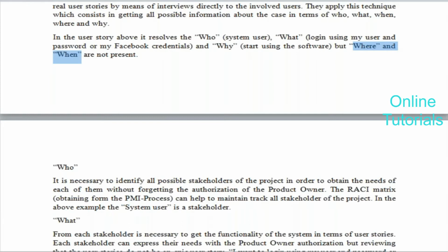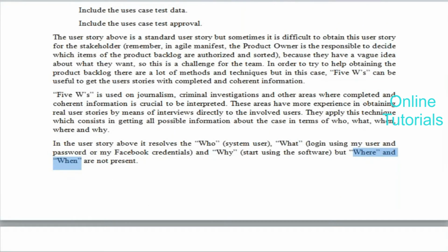Once you have written the user story followed by acceptance criteria, it will be forwarded to the agile team, so that based on this, where and when will be decided and completed by the agile team. That means which technology to use, which implementation, security applications to use, and the whole where and when will be completed by. Understood? So this is what generally a user story is all about, followed by acceptance criteria. You're clear? Yes. So this is what we call a user story.